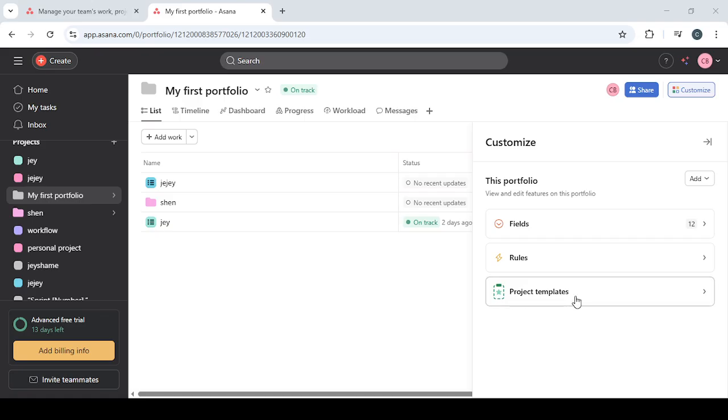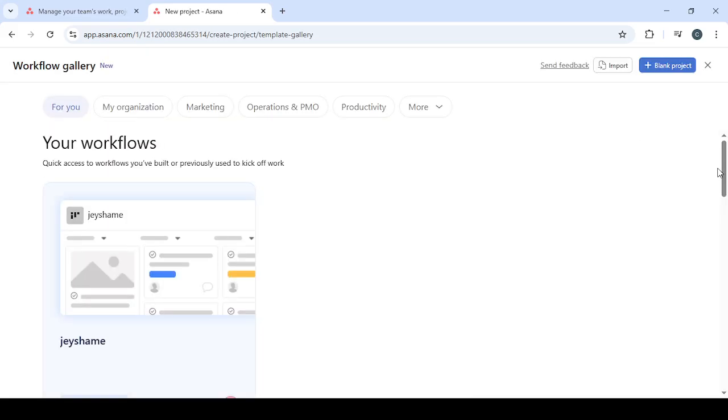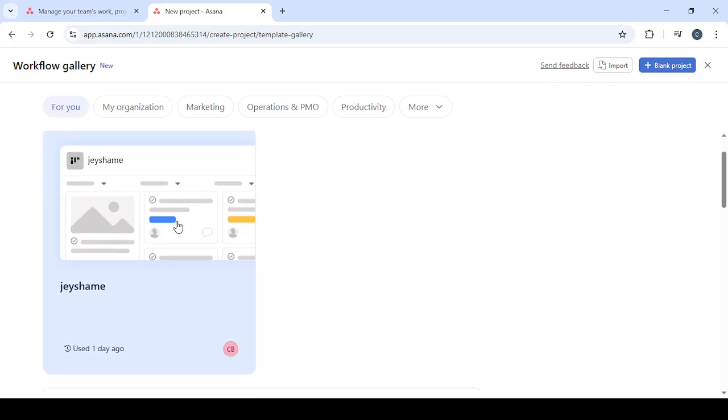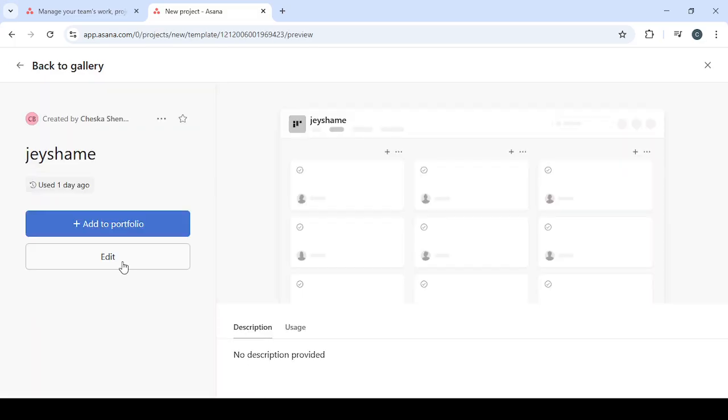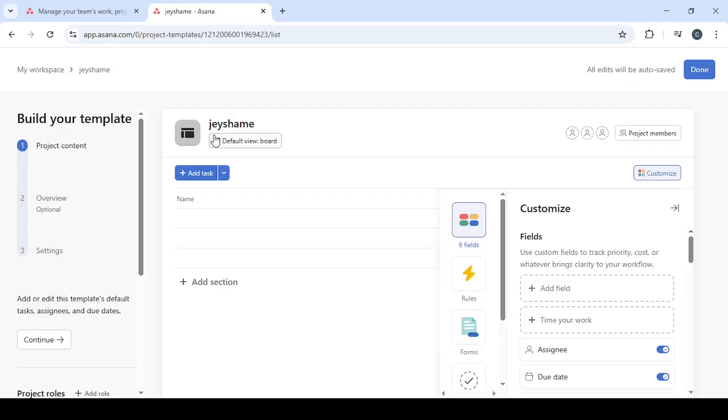With the task fully defined, open its Options menu, often found under a three dots icon, and select Convert to Template. This tells your project tool to treat the task as a reusable blueprint, preserving the description, subtasks, attachments, and custom fields so they're ready to be copied on demand. Think of it as freezing your best version, so every new task starts with the same strong foundation.